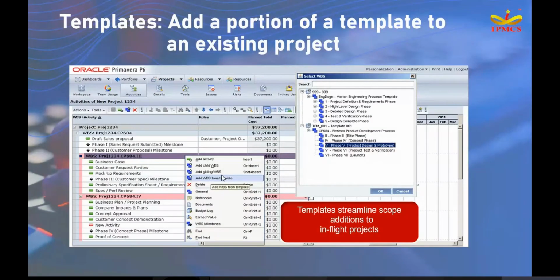Apart from this, you can have templates. Using this web-based solution, in the web, you can create templates. For example, for a civil residential related project, if I create a template and keep it, then from now onwards in future, whatever projects I'm creating, I can take that template and edit it, do the modification. No need to start from scratch. So this is available in the web solution.